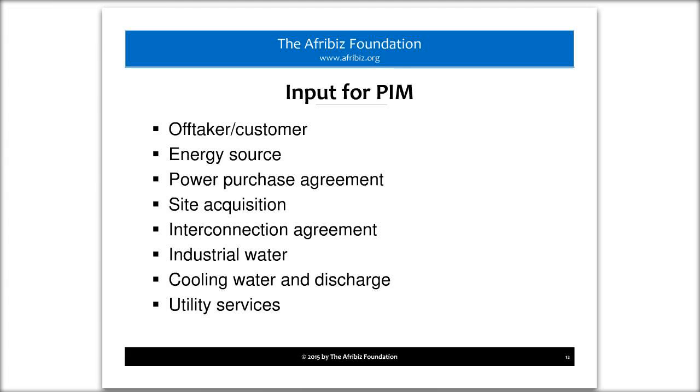But then, when you look at site acquisition, and we will bring this out in more detail when we talk about the country factors, site acquisition is not necessarily that simple. When you look at doing it in the United States, oftentimes I'm going to look at private land and negotiate for the use of that private land. And in Africa, in many countries, foreigners cannot own property, or it may be limited.